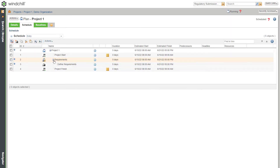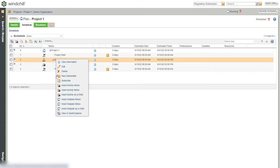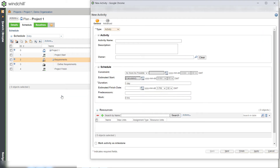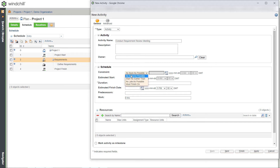Similarly, let's create one more child activity to conduct a requirement review meeting. Schedule it as soon as possible because we want to start it as soon as the Define Requirements activity is complete. Enter 3 as predecessors because the requirement activity ID is 3, and provide one day duration for this activity.